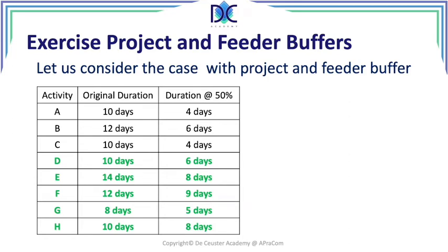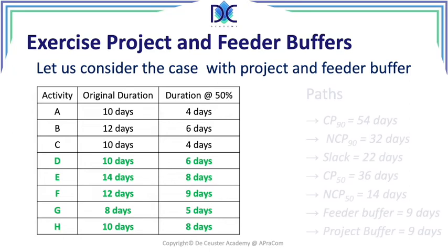You see they're not exactly the 50% rule, but let's assume that we got this information by discussion with the people who will be working on these activities and who are subject matter experts. So we have for them 90% and 50% duration estimate.